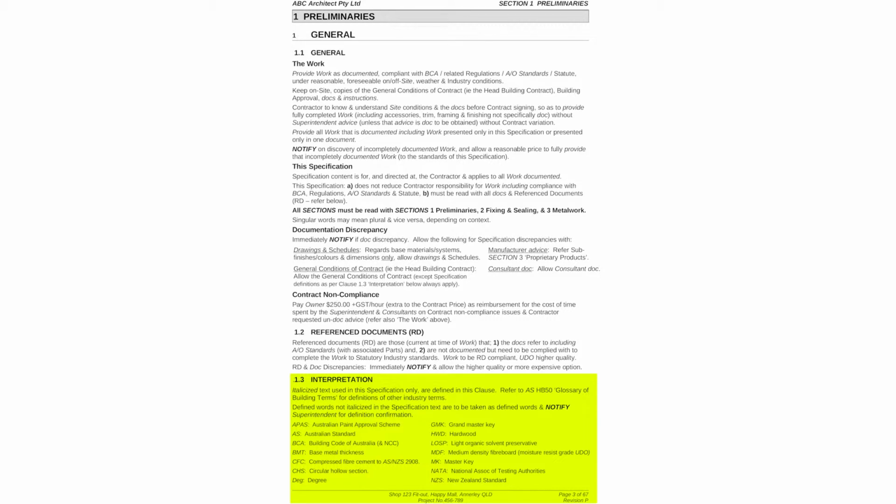Now to clause 1.3, interpretation. Definitions are vital, so need serious attention. These definitions only apply to the spec. Defined words throughout the spec are italicized. This is critical. Complex written documents need italicized defined words, and now you are looking at the first specification to have these. Not using italicized defined words discriminates against all readers and also misses the opportunity for great accuracy.